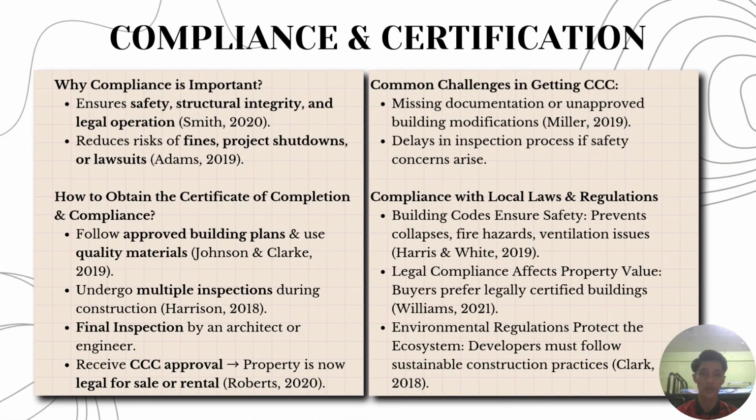Moving on to the compliance and certification. So why compliance is important? Developer must follow local laws, zoning regulation, and environmental policies to ensure that buildings meet safety and legal standards. Ignoring these rules can result in fines, delays, or even demolition orders. So there are several processes of obtaining the certificate of completion and compliance.